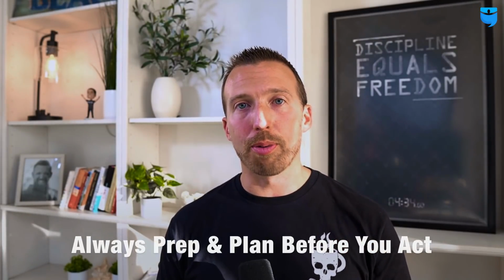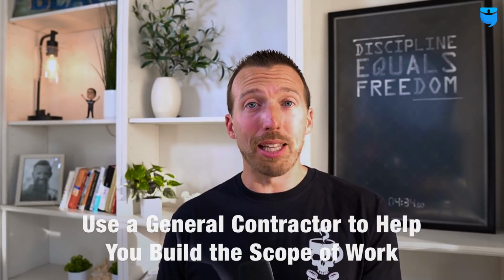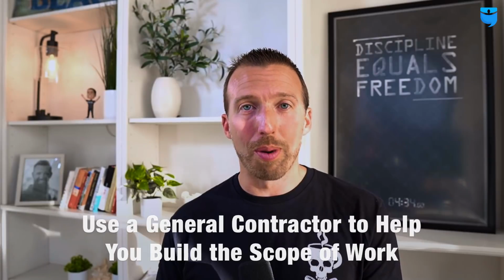Now, when you prep and plan, which was one of my first pro tips for you guys, or second pro tip, whatever it is, I've lost count by now, you prep and plan the property and make a thorough scope of work. Use a general contractor to walk with you. Use a general contractor to help you build the scope. And then you can use that scope that a general contractor makes for you and have other contractors bid on it. That's another tip and trick for you right there.